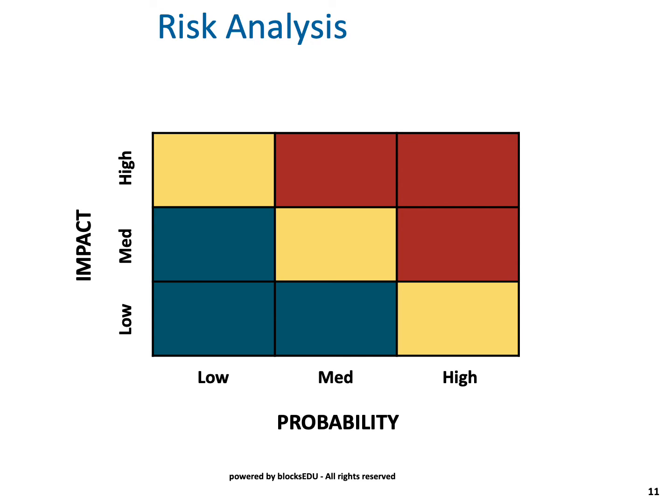Let's say, for example, that you live in an earthquake area, but you haven't had an earthquake in 100 years. The probability of that earthquake actually occurring during the length of your project is probably very, very low. But the impact to your project, if the earthquake actually happens, is very, very high. So you can see that the probability and impact are opposing each other.